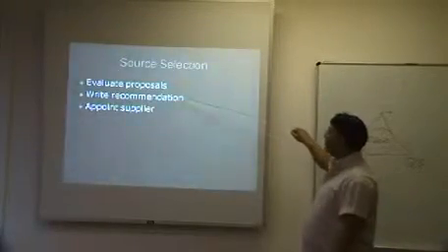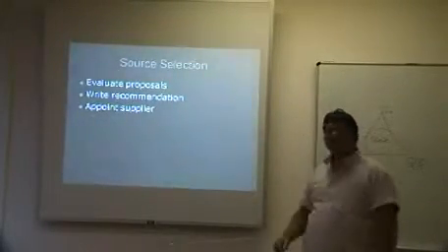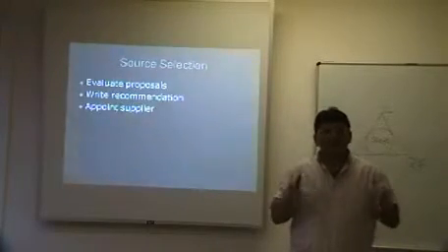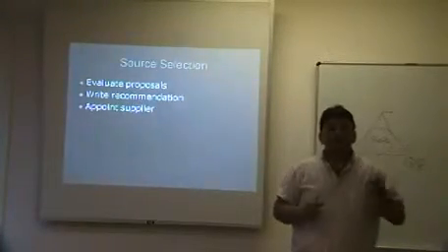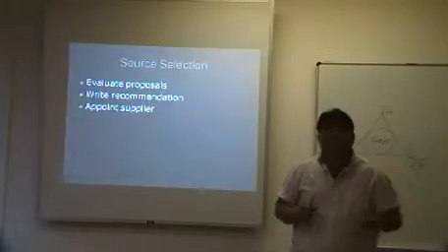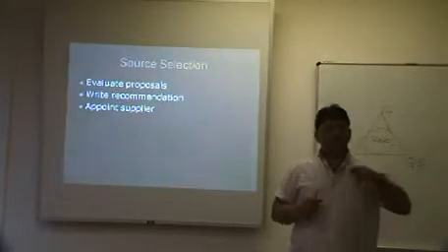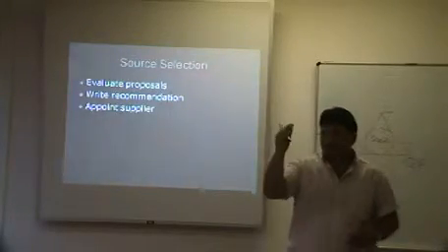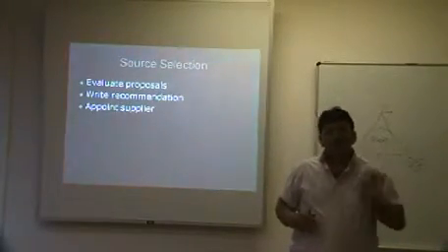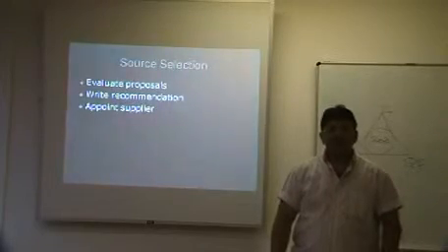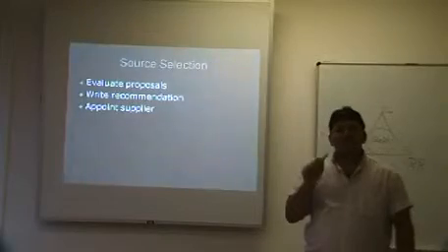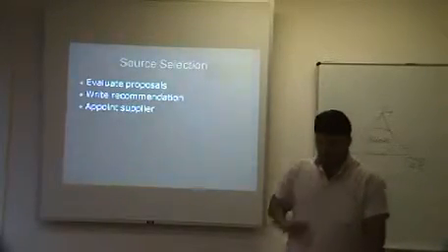Upon that, the recommendation report will then go to a tender committee, and the tender committee will decide if they were happy, if the process was followed and the necessary protocols, and as per your company policy. Based upon that, the procurement committee will approve, and then the supplier will be appointed.